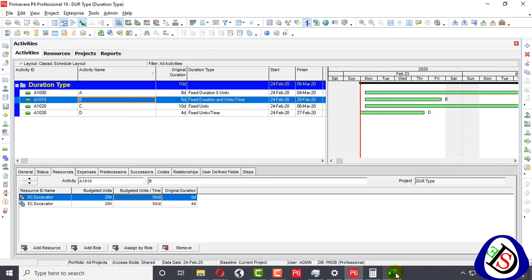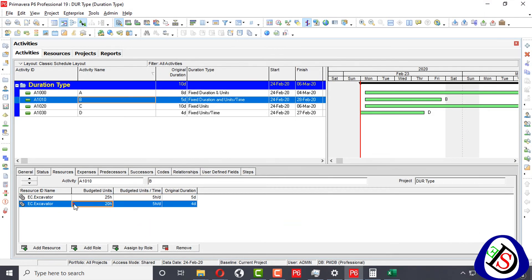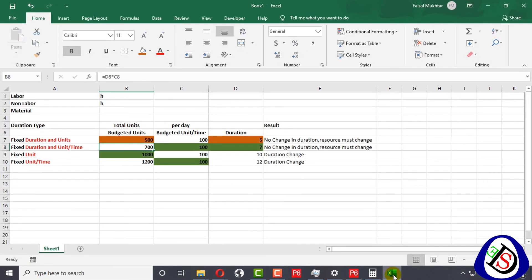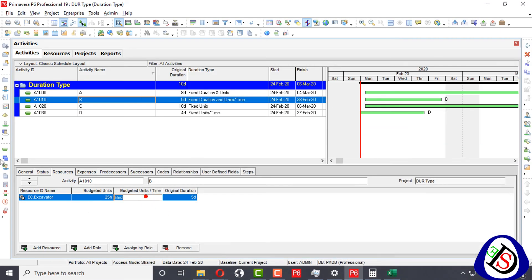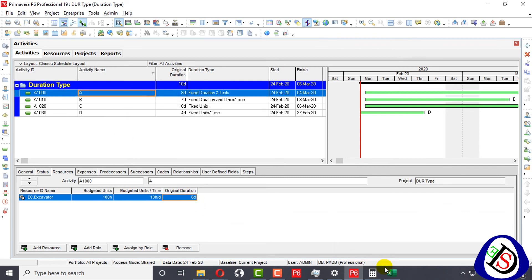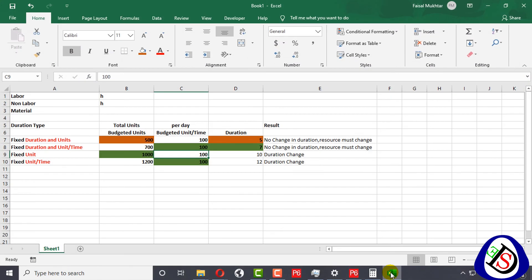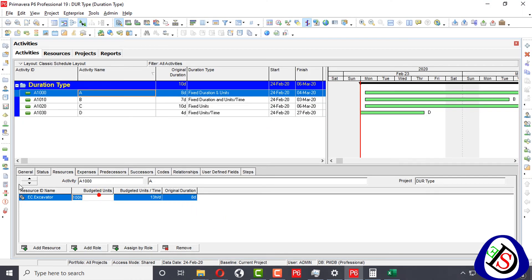I will also show you what I calculated in Excel. In Fixed Units, if I change units per time and duration — say duration is 7 days and units per time is 100 — then total budgeted units will be 700. In the activity, when we fix budgeted units to 500 and the other value to 5, the answer will be 100 hours per day.